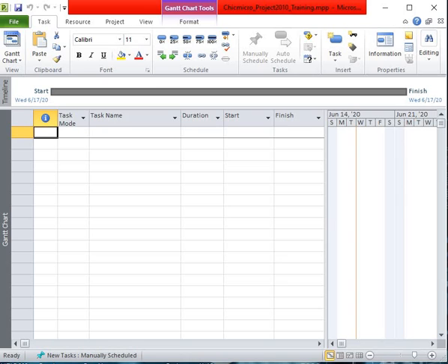As you might expect, Project focuses primarily on time. Sometimes you might know the planned start date of a project, the planned finish date, or both. However, when working with Project, you specify only one date, not both, the project start date or the project finish date. Why? Because after you enter the project start or finish date and the duration of the task, Project calculates the other date for you.